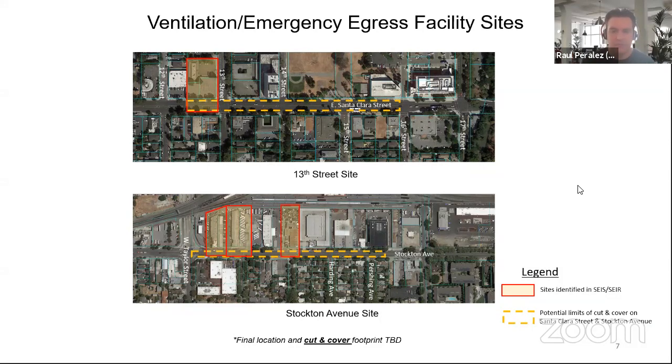There will be segments that are just completely off limits and people will have to divert around. Yes, like I said, it's going to be a sequential type of construction. Segments you will move from east to west or from west to east. I don't know that yet. And yes, it's the steel plates, but now the contractors are using precast panels, which are easier to pick up with a crane, drop in, and restore the street and go underneath and do the rest of the work. I am very confident that LA is not using steel plates, but precast panels, which really match the street surface very well.